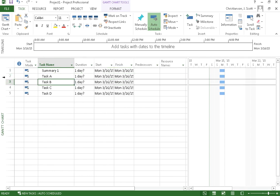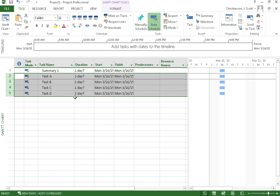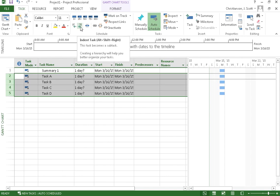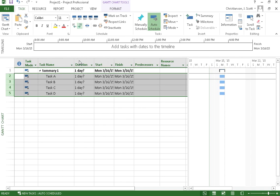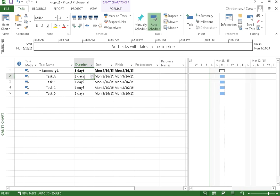I just, what I did there is I just selected the row 2. I held down the shift key and selected row 5. And you'll notice up here under the task ribbon, there is an indent and outdent feature. So I'm going to indent that. And now, you'll notice that this task changes so it looks different on the Gantt chart. And you'll notice that it's actually going to summarize the information about these tasks underneath it.